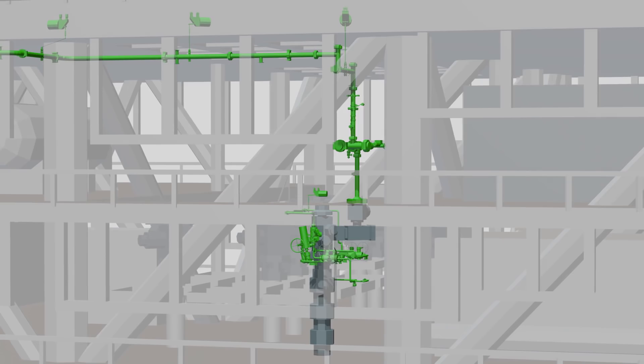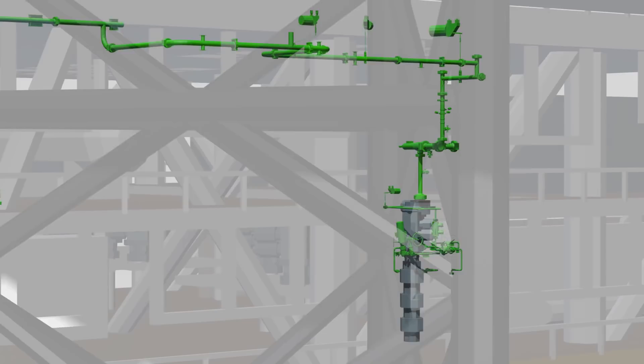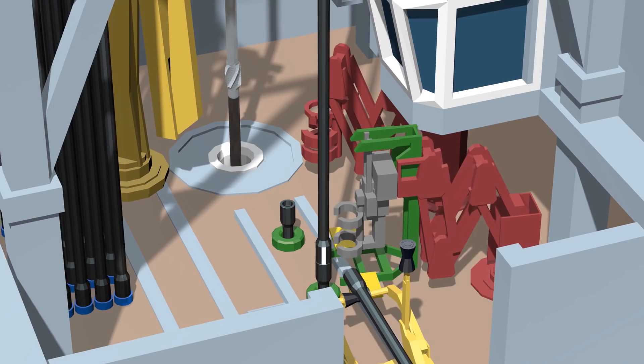At the same time, drilling of the reservoir section got underway. We used the NSCO 120 to rack back long sections of casing and tubing, ready to be run in the well. This was the first time that tubing had been racked while drilling, and it saved a lot of time.